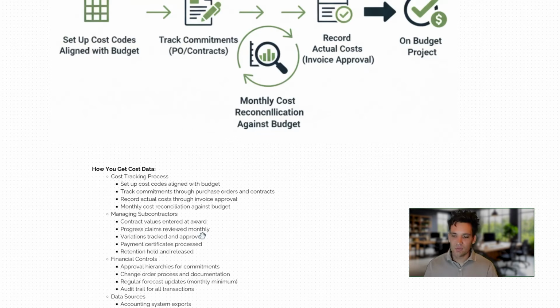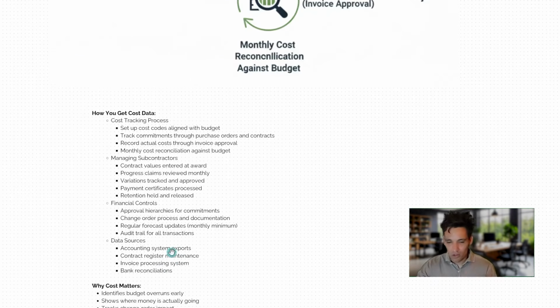And within this system, we should integrate some sort of financial control. So for example, for financial commitments, signing a contract, we should track whether those have been approved by the relevant levels of management authority. Change orders, again, have been reviewed, approved, negotiated, processed. And basically, we want to track any of our commitments and that they've been appropriately approved. To actually record this data, you can integrate your accounting or invoicing systems, or you could just manually track it with spreadsheets or in a software like Mast.